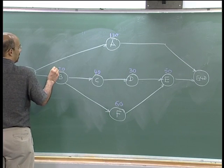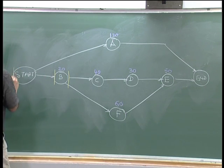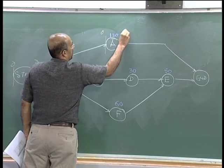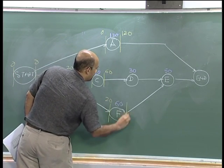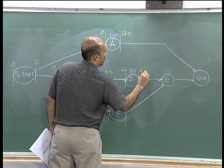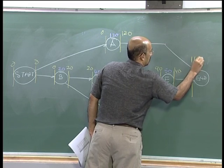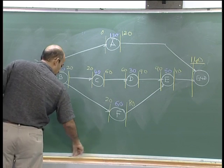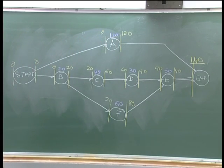You might have used a tabulation or the network. Setting up a tabulation takes a little more time for a problem of this nature, so I would suggest using the network. So we have 0, 0, 20, 60. If 140 is where the end is — I am not going to do the backward pass, let us just go through it. The critical path is B, C, D, E.